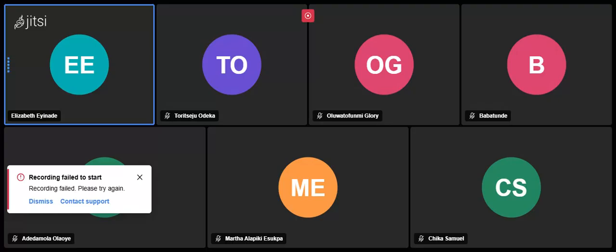But when you are certain, okay, for instance, a fintech application to send money, these are all the features that it should have. So you list out those features, and you're putting them in your product backlog. So product backlogs are where you have a list of items, features that you want your engineers to work on. And it's normally used in the agile environment. So you have features that you want them to work on, but they are not working on everything at this point in time. So the backlog shows you every feature, even the one you want to do in the next 2 years, everything is there.